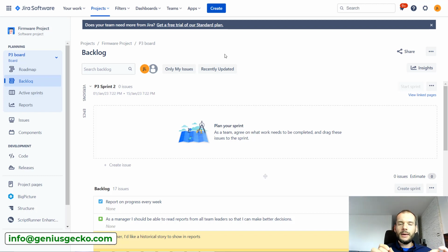What is great about sprints is that it is a relatively short period of time and planning happens after each of these periods. So there are a lot of opportunities to change direction and adapt to a changing environment. Basically every 2 weeks, or however long the sprint lasts, we do the planning so we can decide what is the most important in a given period of time. So if we're done with that, let's jump into Jira.